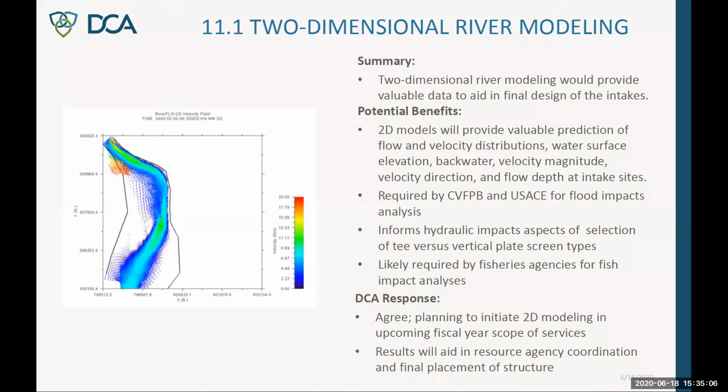And, as far as flood management goes, it's actually required by the Central Valley Flood Protection Board and the Army Corps of Engineers in the flood impacts analysis that will go along with permitting the project. And, in the planning phase, the use of this can inform the hydraulic impacts aspects of the selection between the T and vertical plate screens.